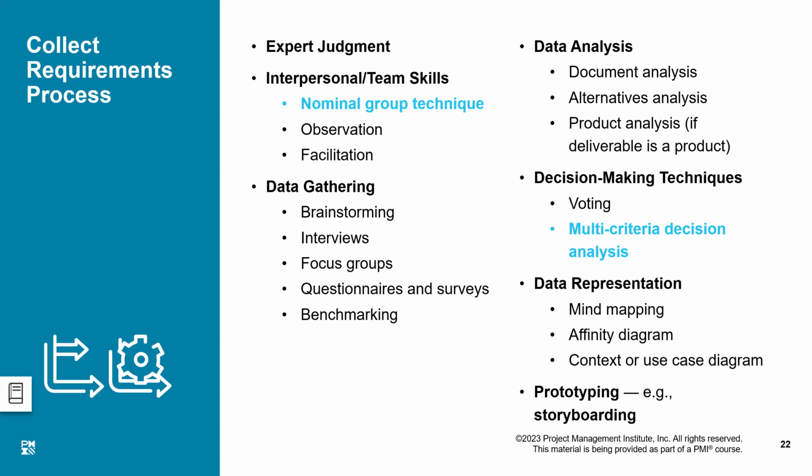Last but not the least, when the data has been represented on paper, the customer, the participants, the stakeholders might need further assurance of understanding how it will look. So for that, I will develop prototypes, 2D models, 3D models, or something like that, which will convince them that all their requirements have been understood and it is proceeding in the right path.